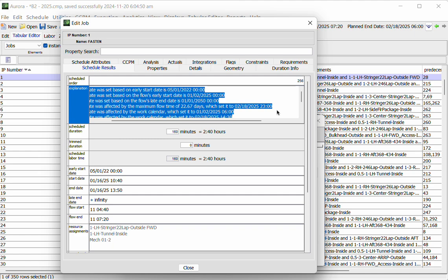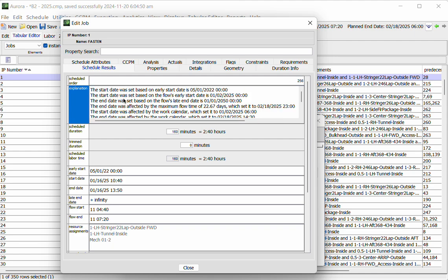There are some higher level analytics allowing you to find, for example, the causal chain for a given activity, what is the driving sequence for that activity. But this here is basically telling me for this particular thing, what are all of the ingredients that went in? So basically, first, did I have a restricting start date? Then, did my project have any restricting dates? And yes, my project was starting January 2nd, 2025, and so it scooched everything over to that.